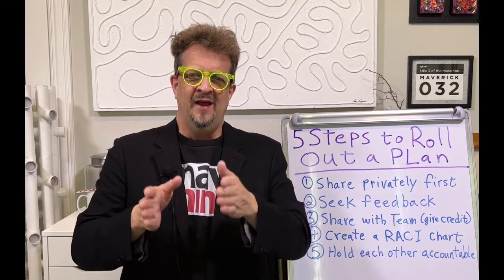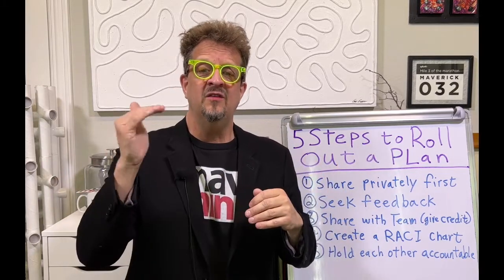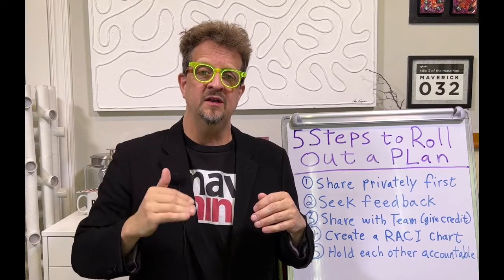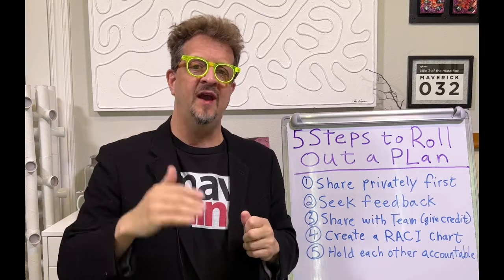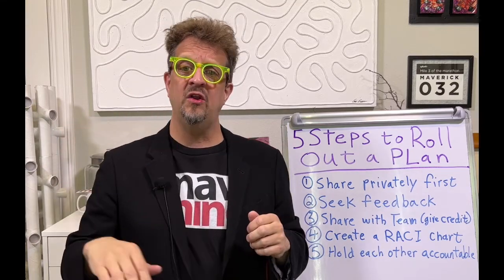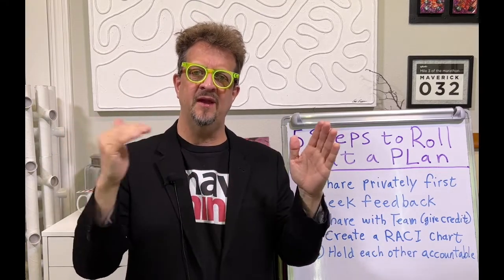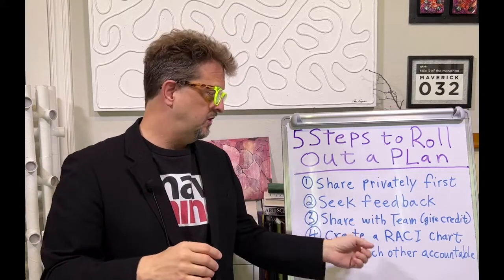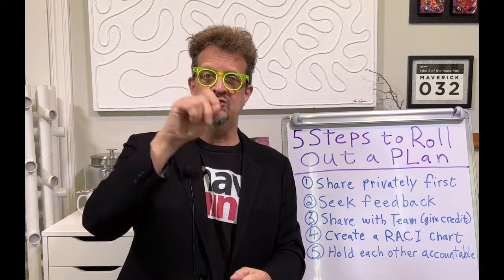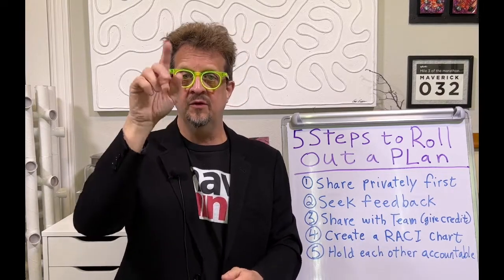And you have each column be the role, and then each row in the grid, so think of it like a spreadsheet, right? Each row is going to be a particular task or a particular workflow or some element of the plan that needs to get executed. And then what you do is you go through the RACI and you check box in the grid where they intersect. Which role is responsible for this task or this workflow or this particular item getting done in the plan?